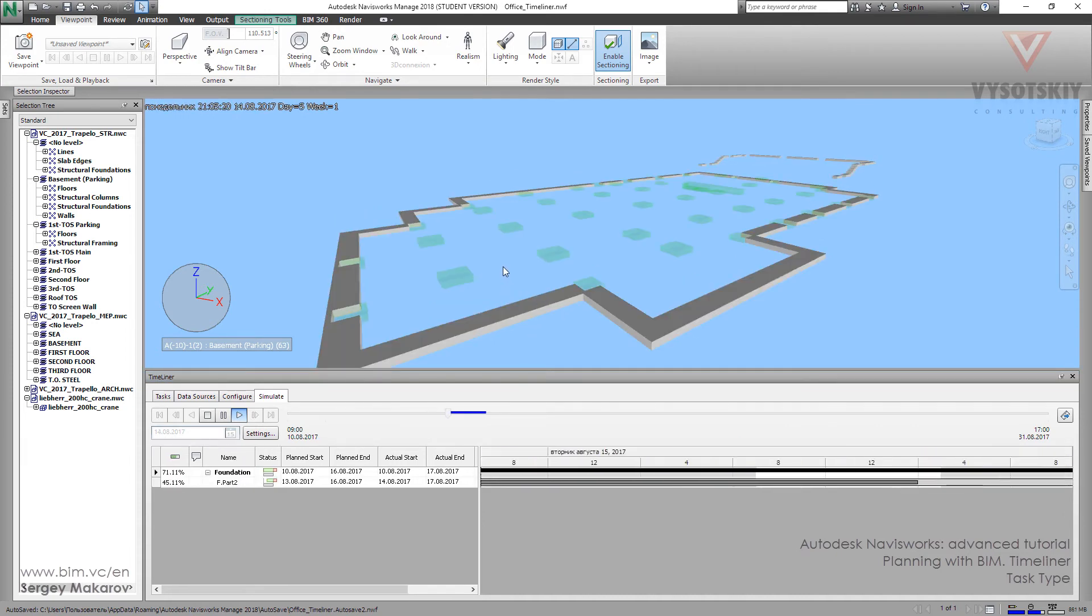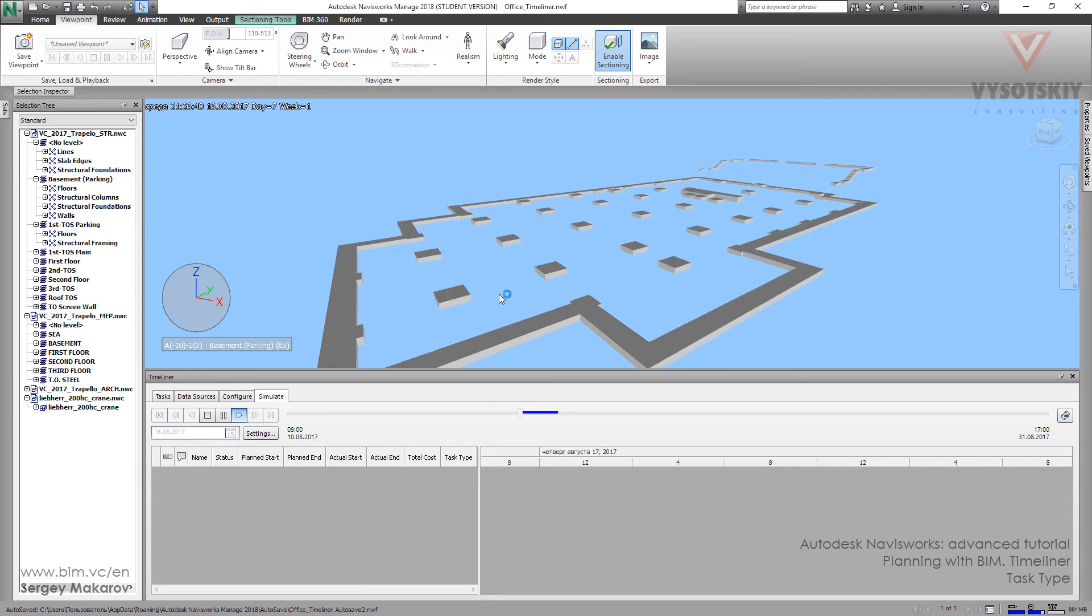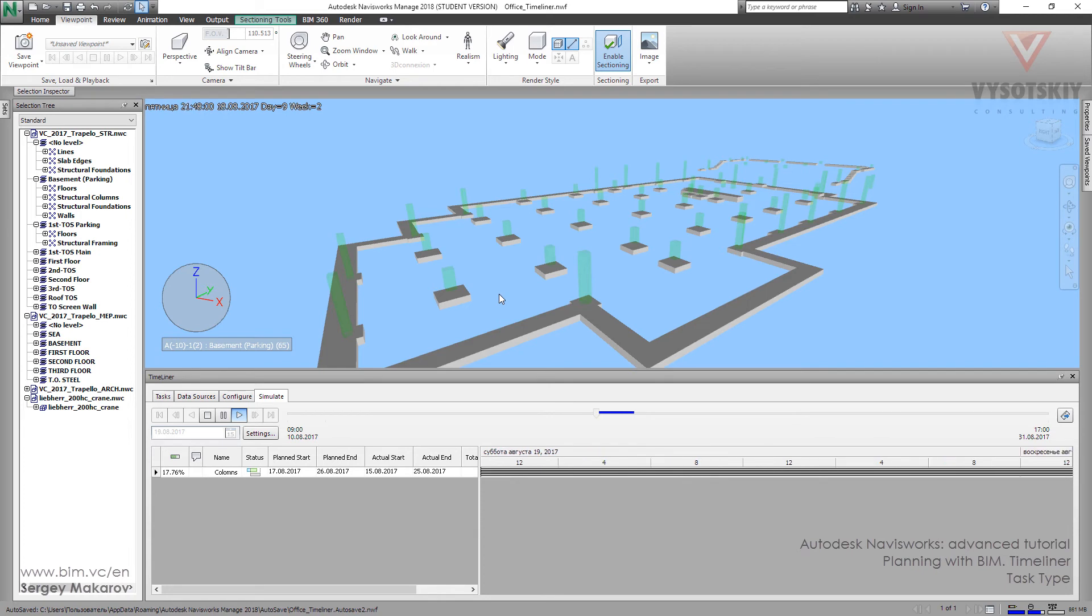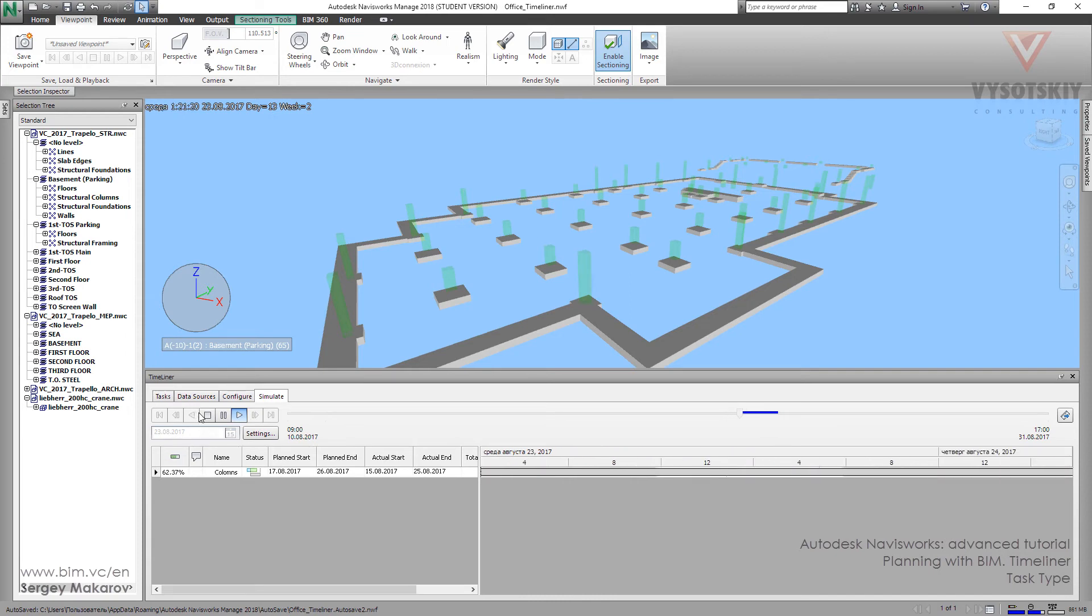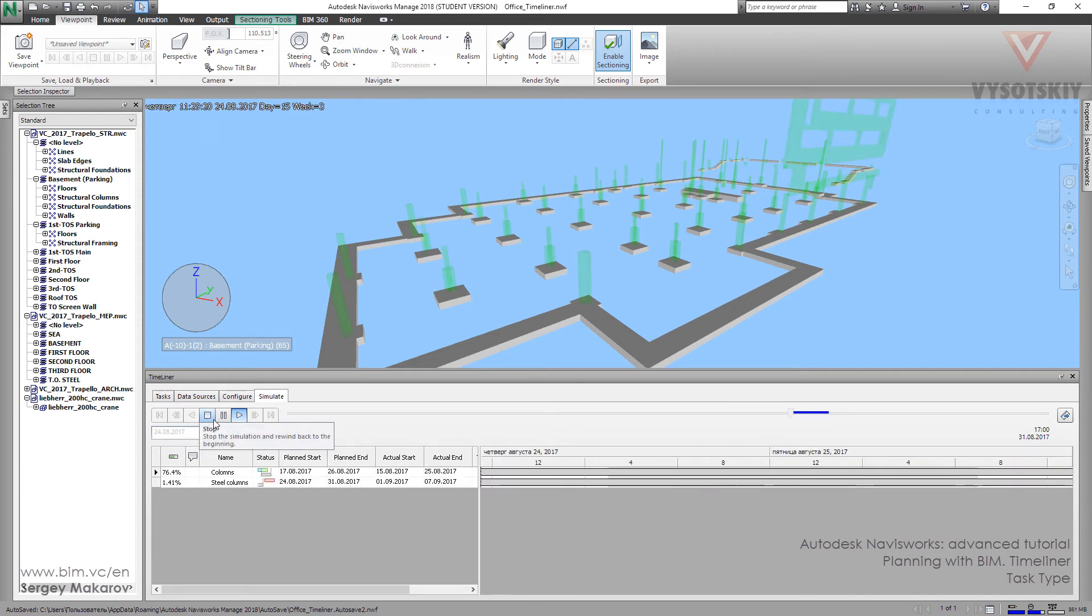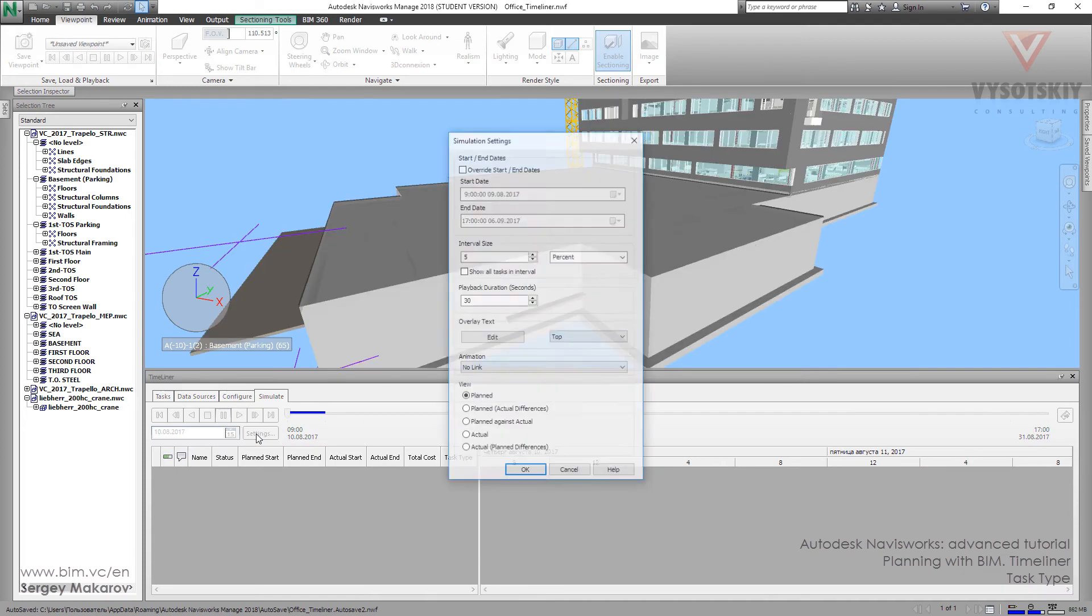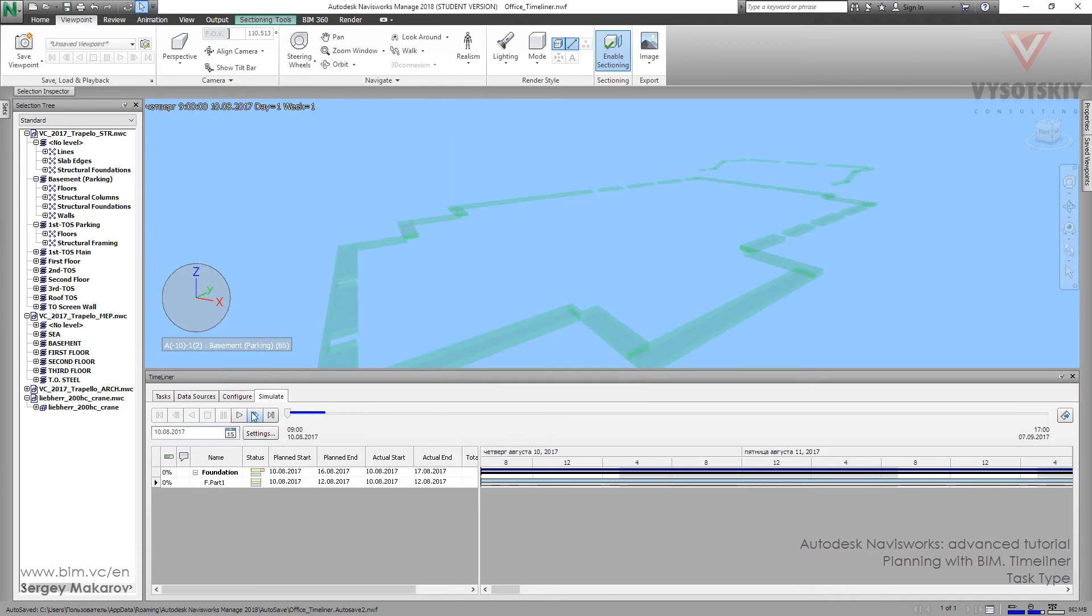Green and the same one. Where's red and where's other? Because not everything is on time as we know from our Gantt chart. Let's go to simulate settings and change it to plan actual. Show plan against actual, and let's start it.